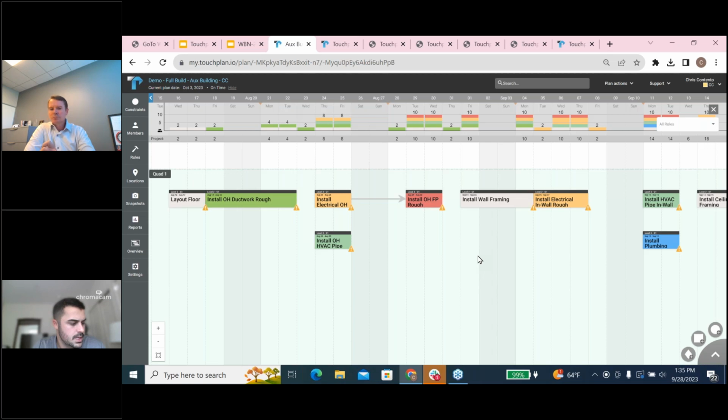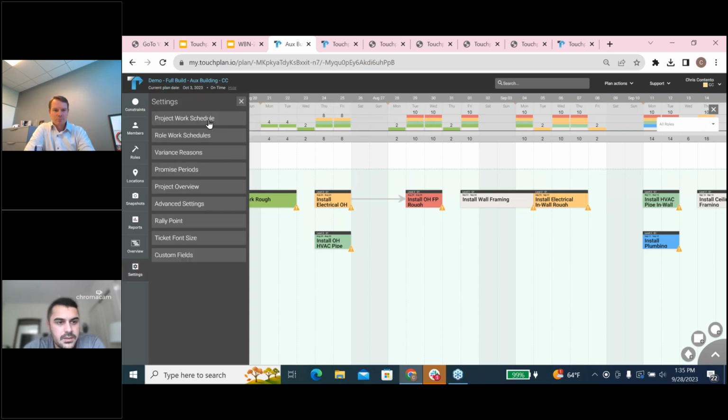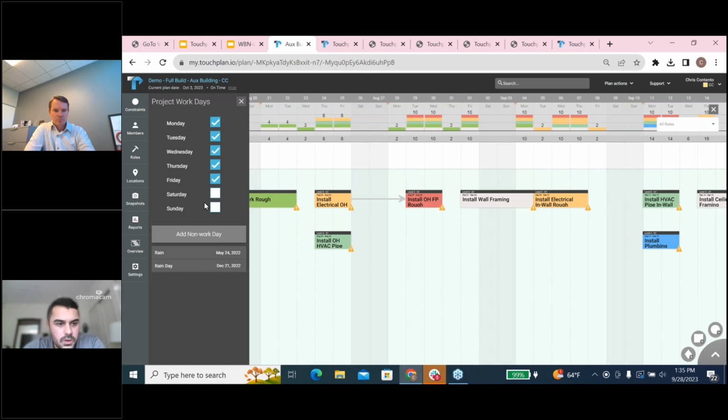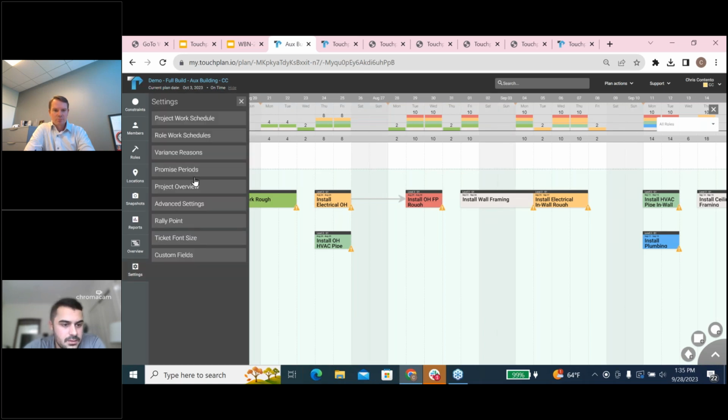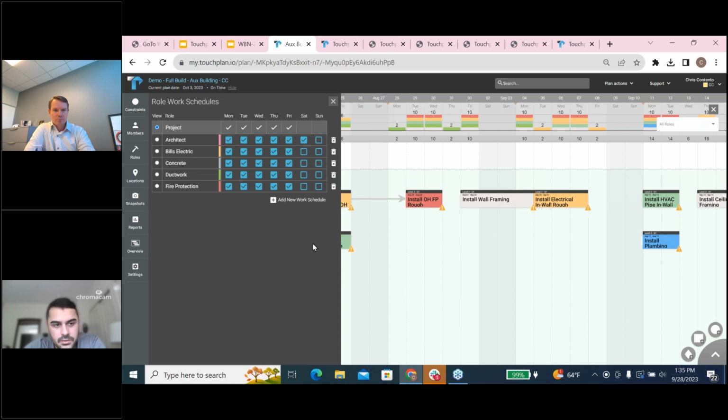Can you switch up the calendar days? Yeah, so right now we certainly have just a Monday through Friday schedule. I can go over settings, I can go to project work days. Maybe for this project, Sean, you had people on the weekends, but you can certainly break that out by 7 days. And to that point as well, we can also do roll work. So if different trades, Bill's Electric, for example, concrete, are coming in on 4, 6, or 7 days, whatever it is, we can create that as well.